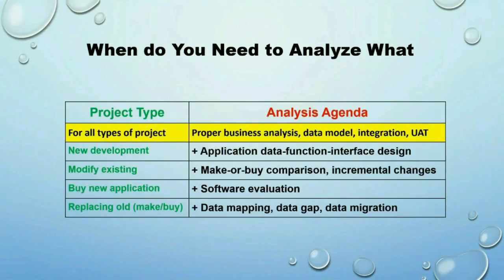Okay? And regardless of whether it's a make or buy, if the new application will replace an existing one, then you need to do the data mapping, analyze and figure out the data gaps, and come up with a data migration strategy and plan. I think I've made a case that there's a tremendous amount of work out there awaiting a super analyst. But isn't that also a tremendous opportunity for you to shine as a super analyst?